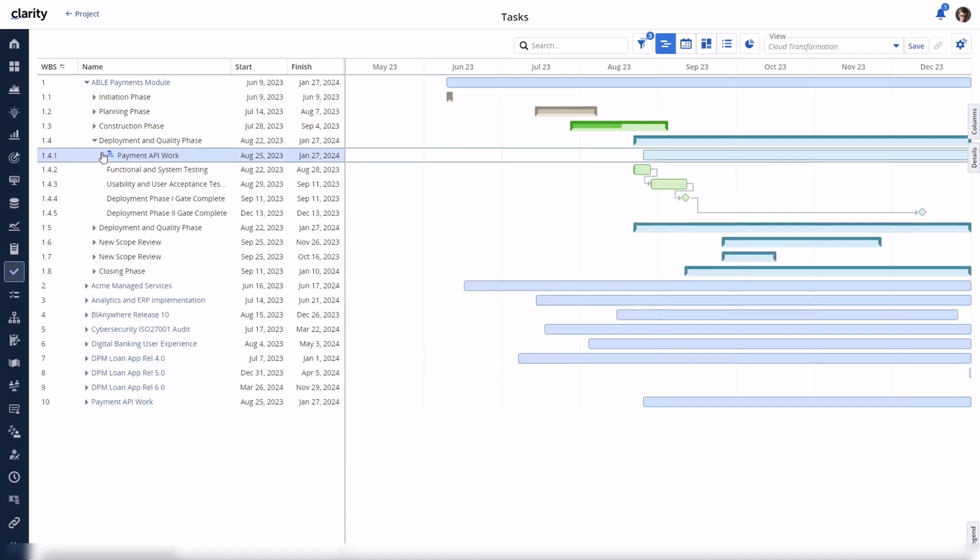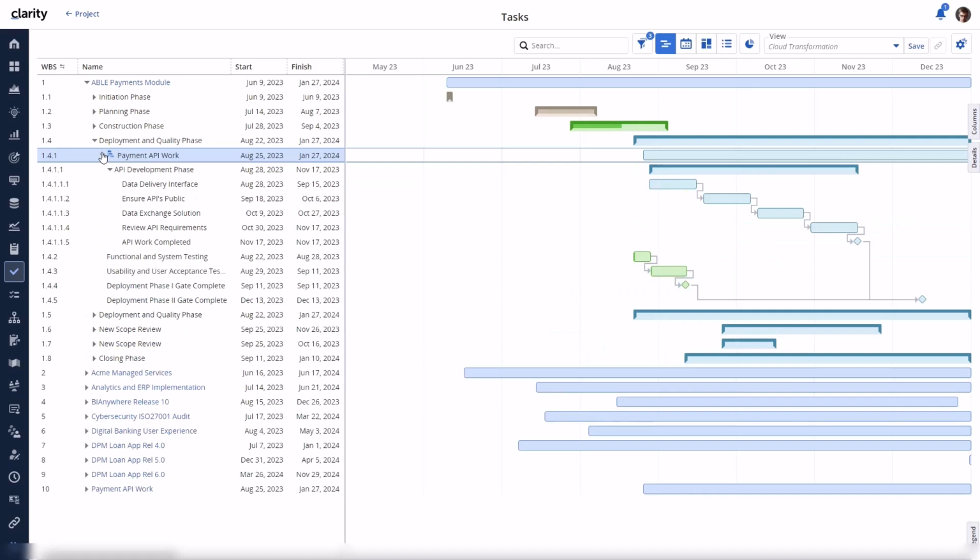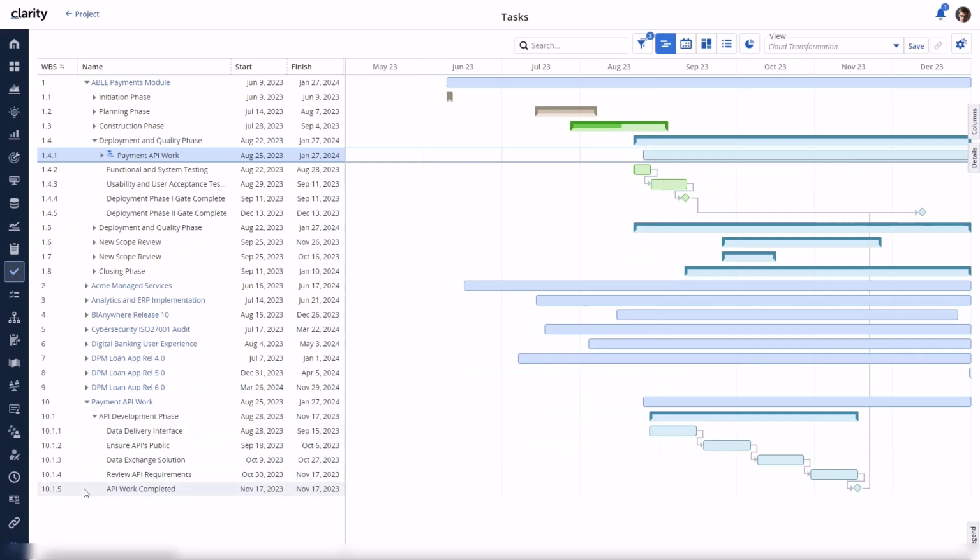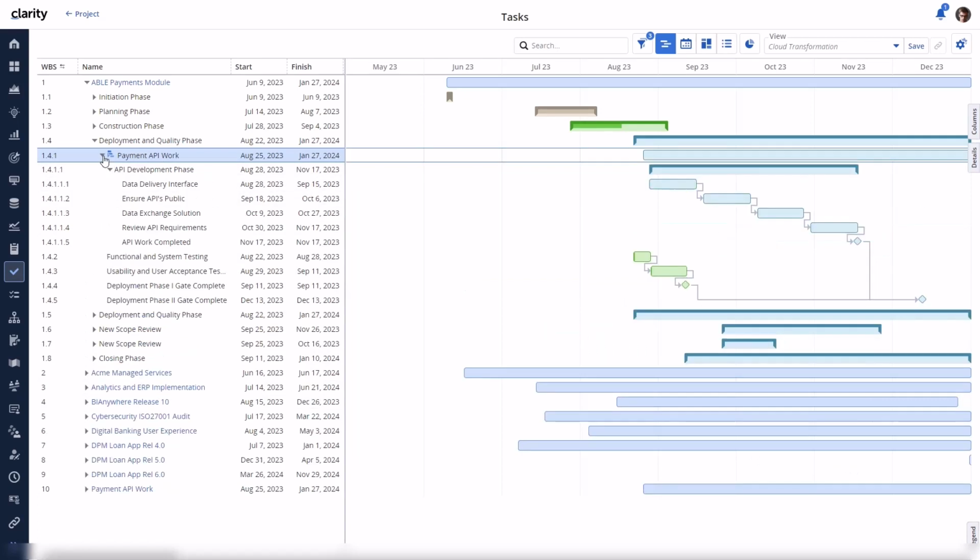As you can see, we can expand and collapse the subproject within the Master Project. If you decide to go to the subproject itself to expand it, the subproject grouping under the Master will collapse. Conversely, if the subproject itself is already expanded, it will automatically collapse when taking the action to expand the same project under the Master Project.